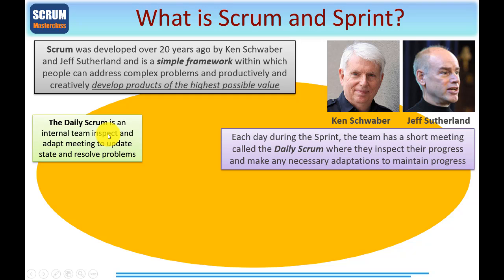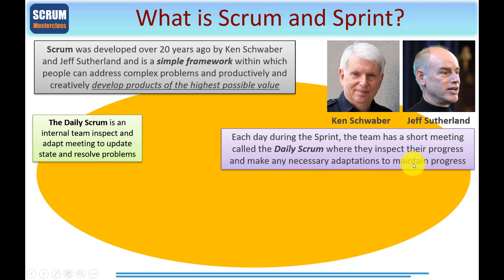We learned about Sprints in the last module, and the Daily Scrum. This is an internal team — the development team — inspect and adapt meeting to update the state of development and to resolve any problems. The key words here are inspect and adapt, which is a watchword for Scrum. A Daily Scrum occurs each day during the Sprint. So if a Sprint is lasting five days, you'll have five Daily Scrum meetings. The team has a short meeting where they inspect their progress and make any necessary adaptations to maintain that progress — that's your inspect and adapt right there.